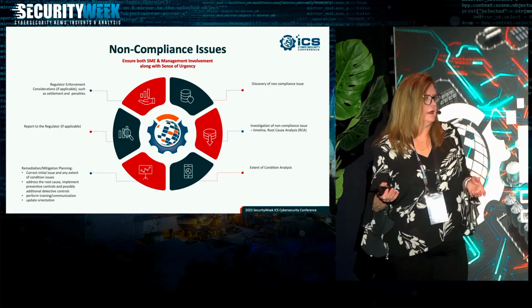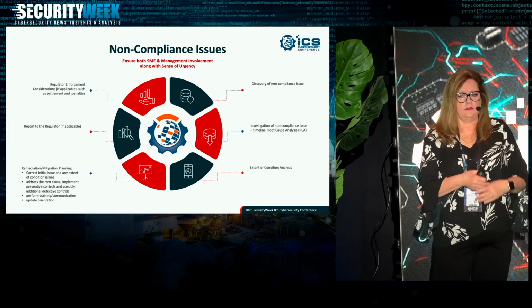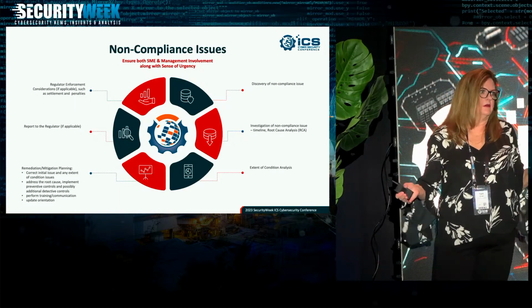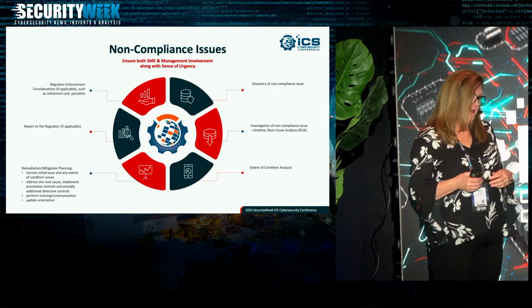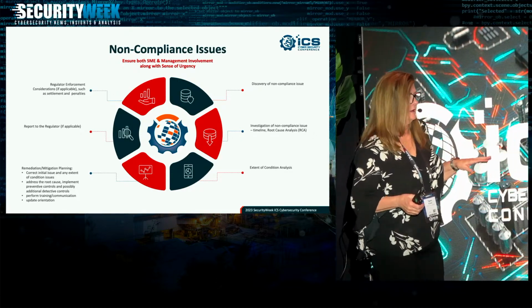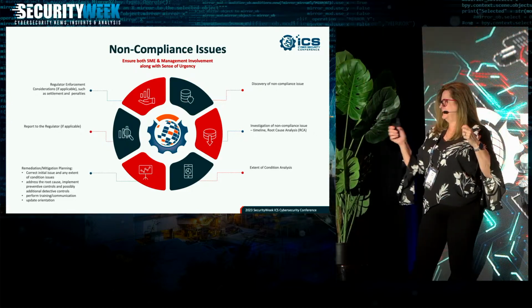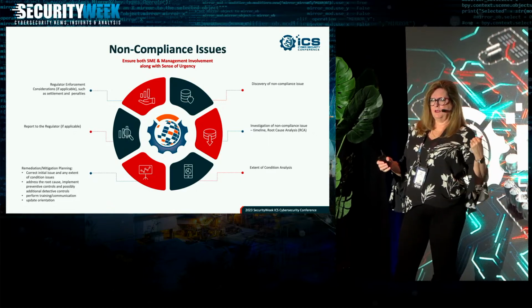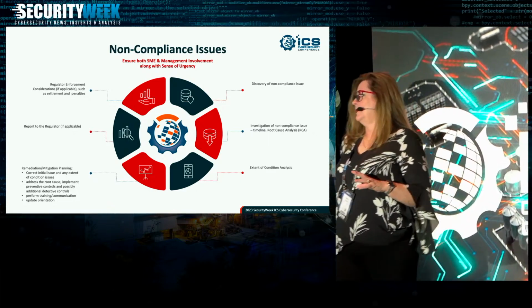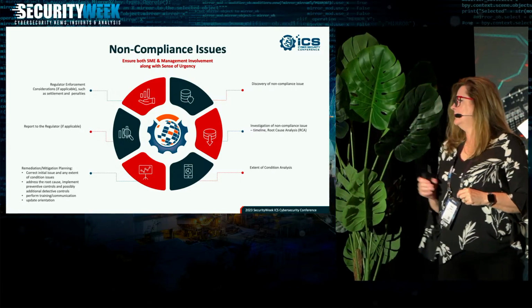You'll also want to look at, well, how bad was it? Was it just this one thing, or was it across the board? That's called an extent of condition. It doesn't always have to be done up front because maybe you can already tell, okay, this is really bad. We just completely misinterpreted this requirement and we learned something from another entity, and you can go based on that and make that a step in your mitigation plan. But if you know, okay, we checked, we just found 3 more, then you can include it there.